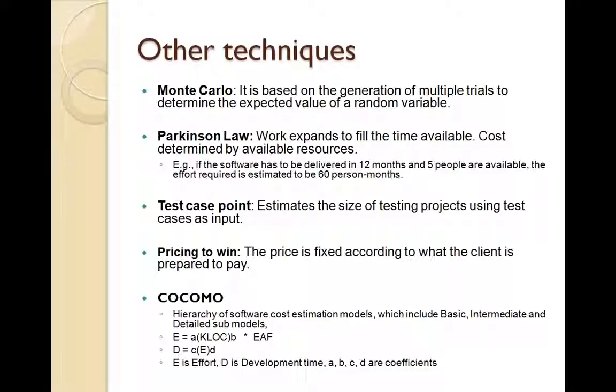Another technique which is practically used is pricing to win, which is a cost estimation technique. So price or quote as per what the client is prepared to pay, whatever is the bid amount and whatever is the quotation amount. Based on that, we try to bid and get the project.